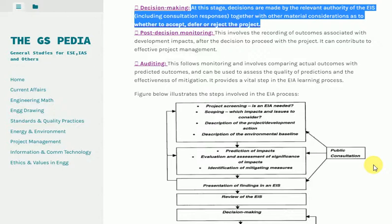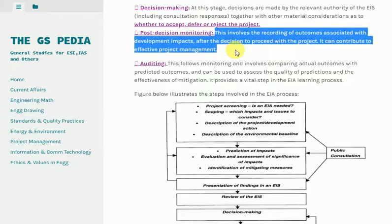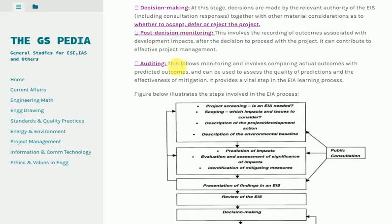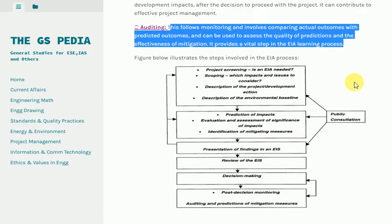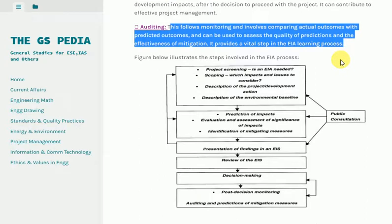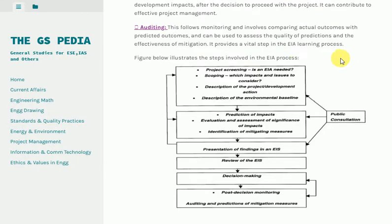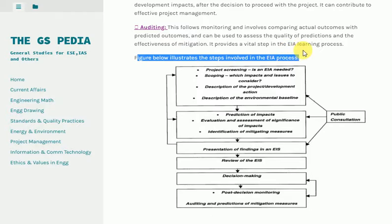Post-Decision Monitoring: This involves the recording of outcomes associated with development impacts after the decision to proceed with the project, and can contribute to effective project management. Auditing: This follows monitoring and involves comparing actual outcomes with predicted outcomes, and can be used to assess the quality of predictions and the effectiveness of mitigation.